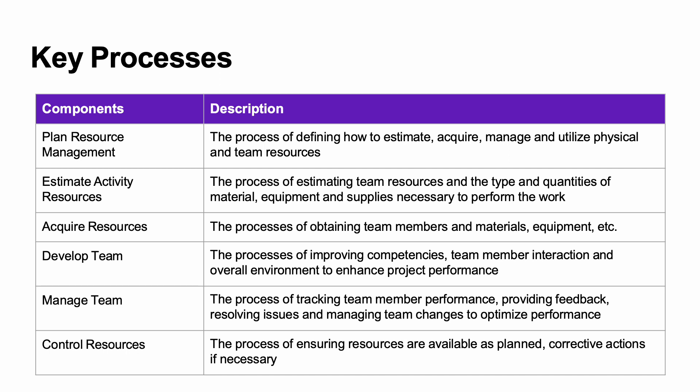Controlling resources ensures that human, material, or equipment resources are available when required, and that corrective actions are taken if necessary. For example, you don't want materials delivered to a site too early — they just sit and risk being stolen — but if they arrive too late, it affects your schedule. It's about managing resources so they're there when needed, and understanding how to rectify issues when they're not.